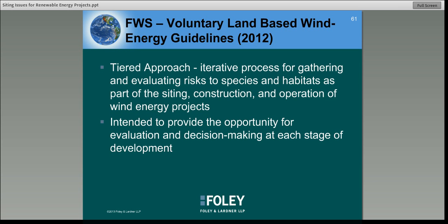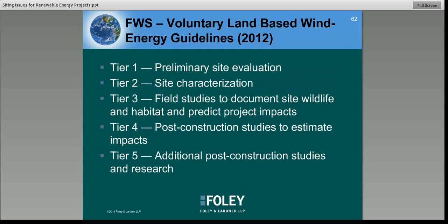It is definitely encouraging people to get involved earlier with the agency, which we would always suggest is the way to do it. Under the guidelines, Fish and Wildlife will respond to requests within 60 calendar days. So I know there's concern that this will slow down the process, but the guidelines were put together with that input that we needed this to move along, and so there are provisions for quickly responding.